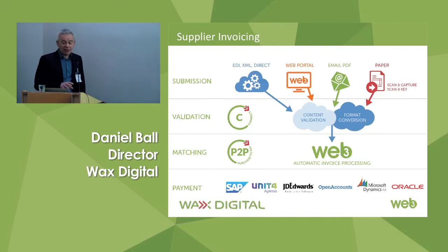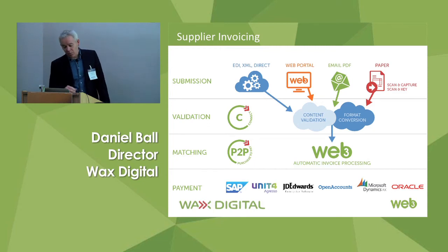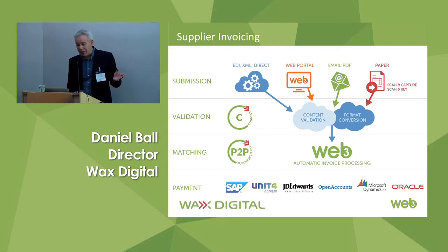So the main potential process change for suppliers is invoicing. And we'll typically recommend to clients that they take this transition in stages. So make the first stage as simple as possible, which generally means just getting them to email PDF invoices to a new email address. And then we'll take care of extracting the data from those emails automatically and finding a match.